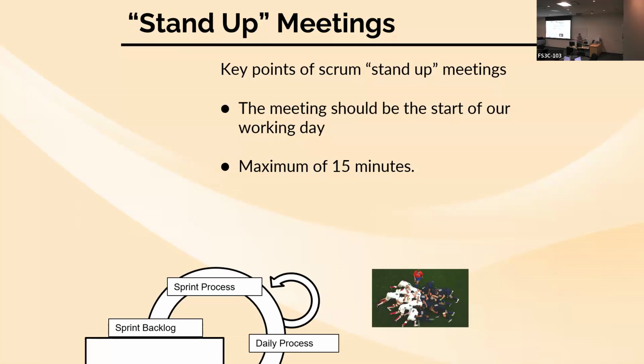I've seen some teams do some pretty draconian measures to maintain this being a short meeting. I've had one team that used task timers during these meetings to basically say, if it is your turn to tell us what's going on, your timer is running, so you can see the cumulative timer of how much time each person is taking in our conversations. Every morning it would be like, all right, you've been talking 5 times as much as everyone else. We need you to pull back so everyone else can be working on this process.